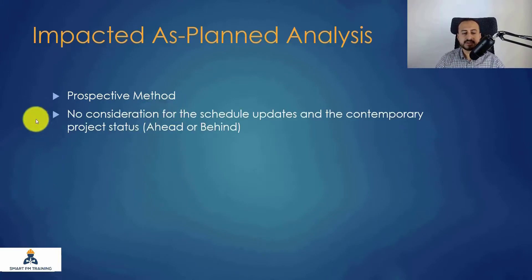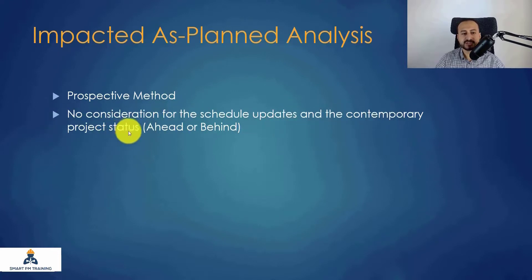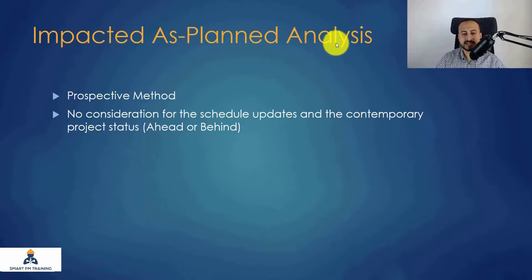There is no consideration for schedule updates and contemporary project status — whether ahead or behind. I am using only the baseline schedule, so for the Impacted as Planned analysis I'm using the baseline program of work, which means there is no consideration for the current project status.